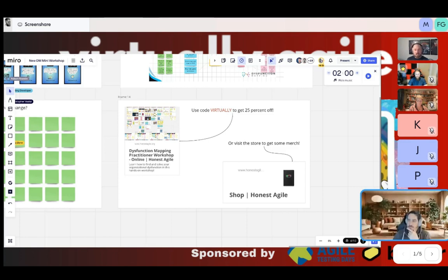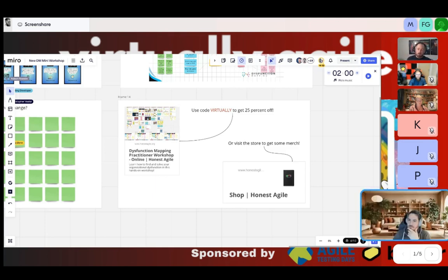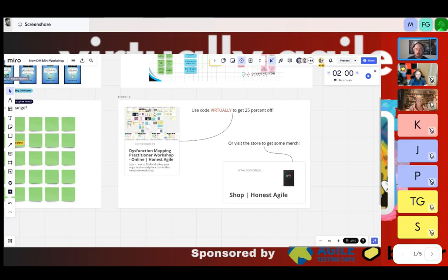What you'll find is the more you go through that pattern, the more you'll start to identify that there's some stuff that on its own doesn't necessarily matter. For example, a team may or may not set a sprint goal, and that may or may not be a good or a bad thing. It's just a sprint goal. It's not a perfect thing. It doesn't solve every problem. But if the team is having a bunch of problems related to focus, committing to work and getting things done, then the sprint goal might be a thing that could solve that problem. It's really just that relationship we're looking for: if we do this thing, will it solve some of these problems? If so, we'd call this thing the dysfunction and these things the symptoms. Different people can connect them in different ways, and that's totally fine. It's about coming up with a hypothesis that we can test, and then we'll figure that out by going in and seeing if those measures change and if things happen the way we hope they will.